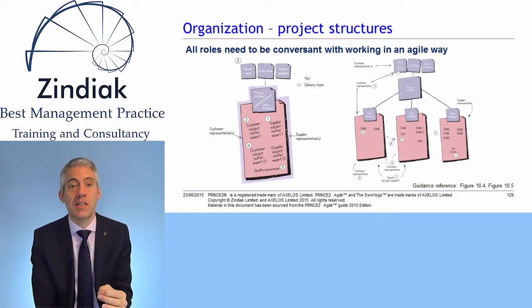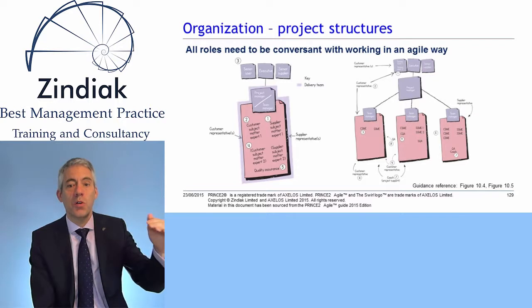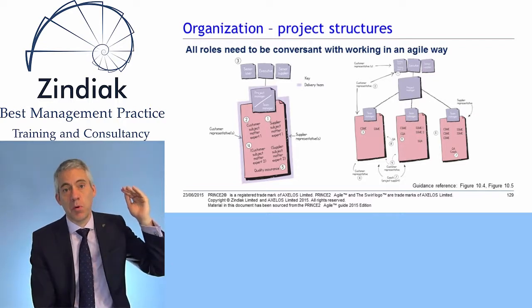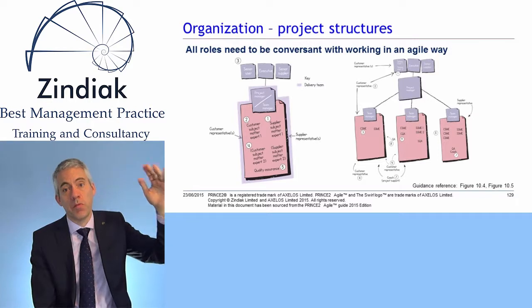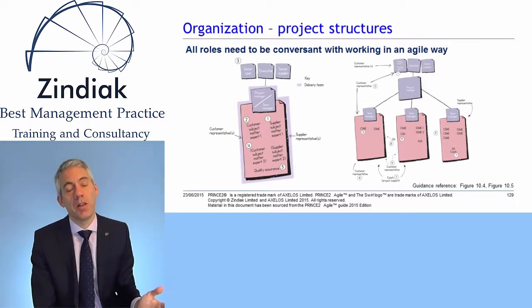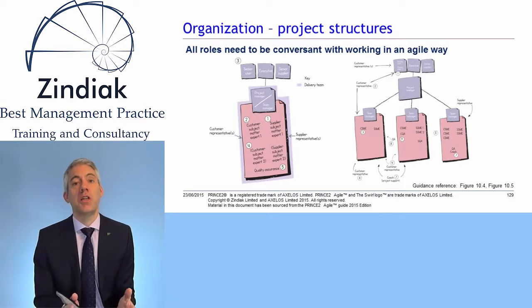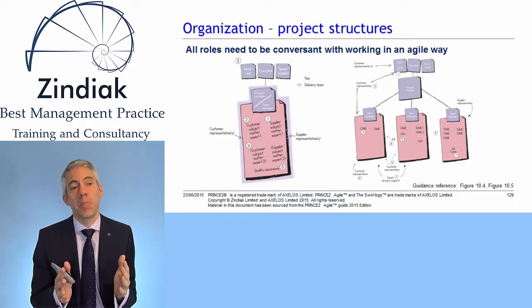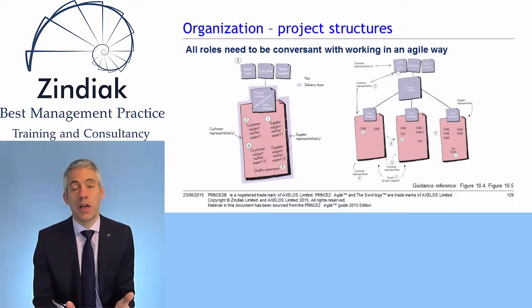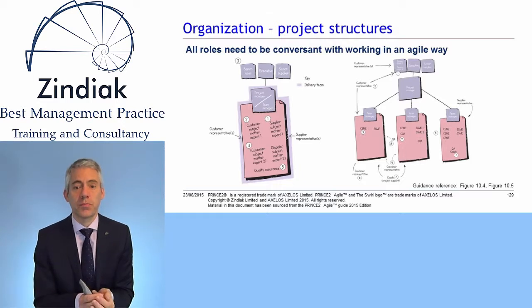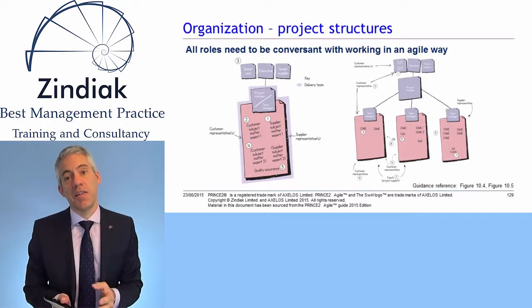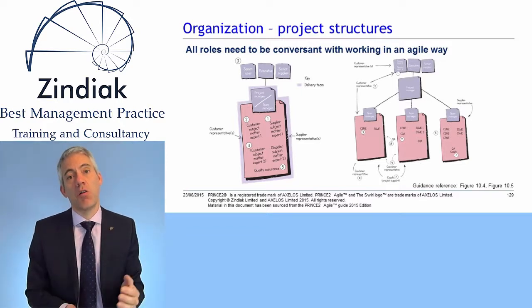The important thing, as I said before, is if you have customer input at multiple levels of the project, and particularly you've got customer input above you as project manager at the project board level and below you at the delivery team level, that you need to ensure within your organisation strategy and your communication strategy that you get a common view and that any anomalies between the view being presented at the delivery team level and at the senior level are resolved.